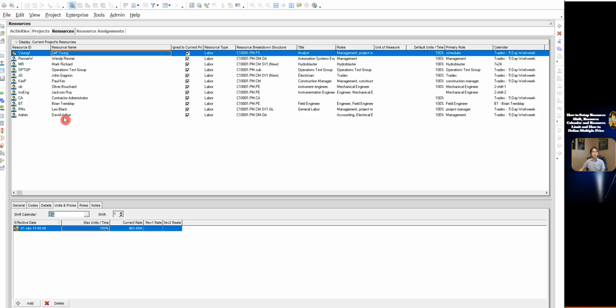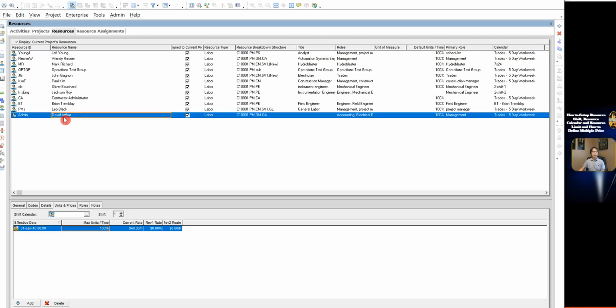Since the organization not only has one project to be carried out, when we define the limit, we have to select the shift calendar and type the applicable shift number for which you are setting limits. So you have to define the effective date for this specific resource and define the limit for the defined effective time.